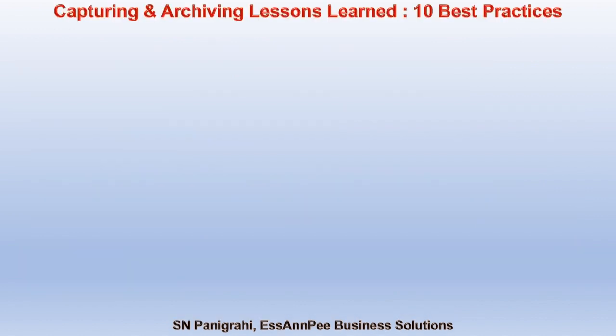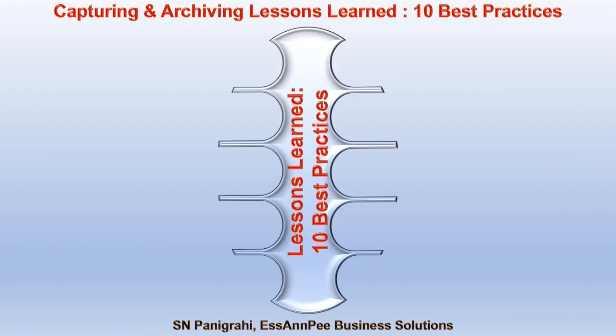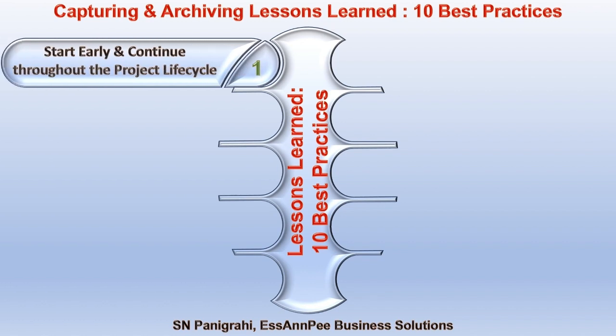Capturing and archiving lessons learned, 10 best practices. Capturing lessons learned in a project is crucial for continuous improvement and avoiding the repetition of mistakes. Here are 10 best practices to consider. 1. Start early and continue throughout the project life cycle. Begin documenting lessons learned from the project's initiation phase. This ensures that valuable insights are not lost and can be captured while they are fresh in the team's minds.